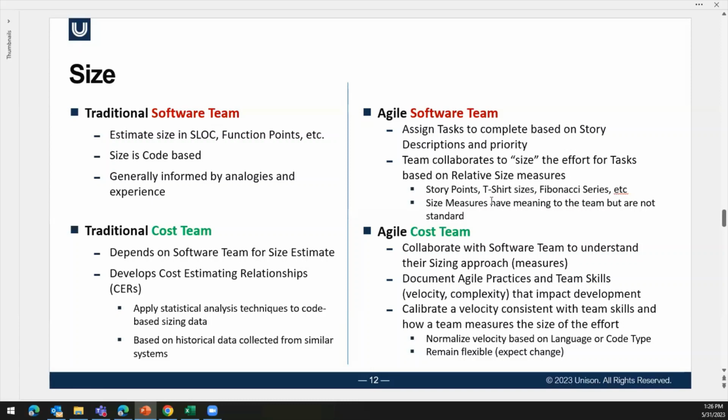So in order for that to make sense for cost estimating, the cost team has to walk into that room, sit down at a table, and participate real time with that conversation. They need to understand the skills and capabilities of the programmers at any time during any of those increments. They need to know, what is it you're building? Is it an algorithm of some sort for a waveform or a database or whatever it is? They need to understand the types of skills and complexities of the software, which leads to the velocity that the team can produce. And then they need the team's definition of velocity.